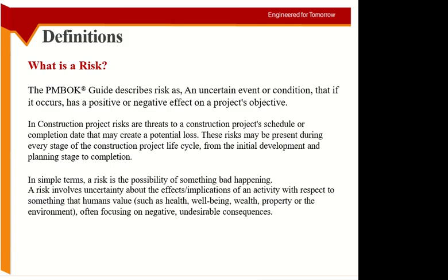Everybody is working, no price increase, nothing closed. But in the same working conditions, now the change has happened. So earlier people were working at temperature of 30, 35. Now the temperature has increased because of something to more than 40. So this is also a risk, even if it does not close any activity, but it is affecting the workers. So risk may not be always affecting the cost or the time. Sometimes it affects the people working on it. So you have to consider that as well. Don't just look at the material aspects, also look at the human aspects.